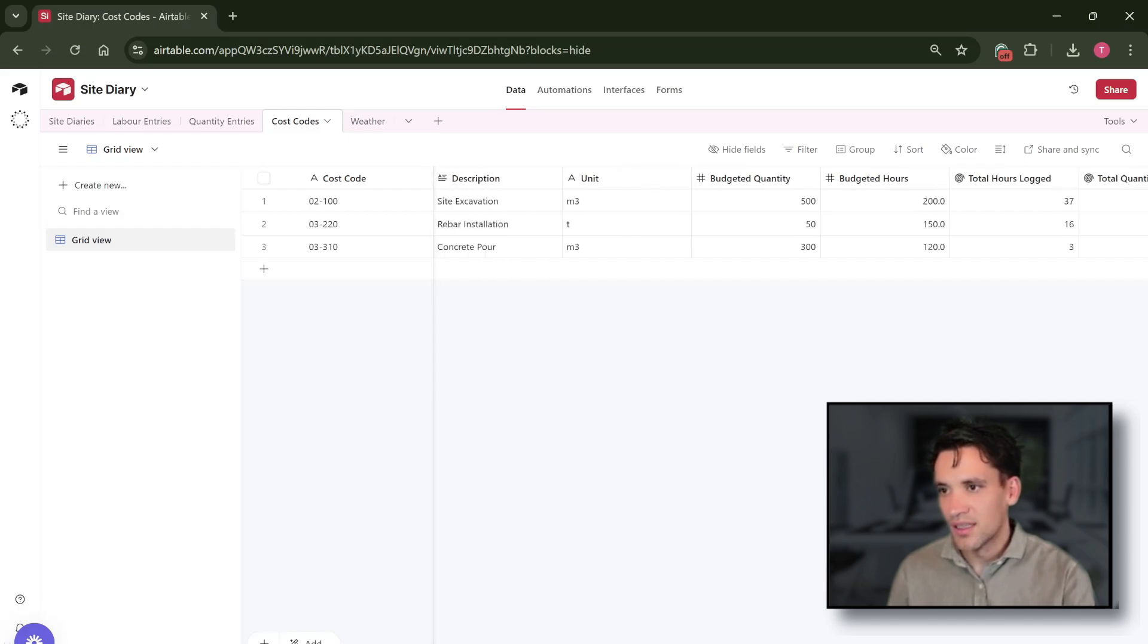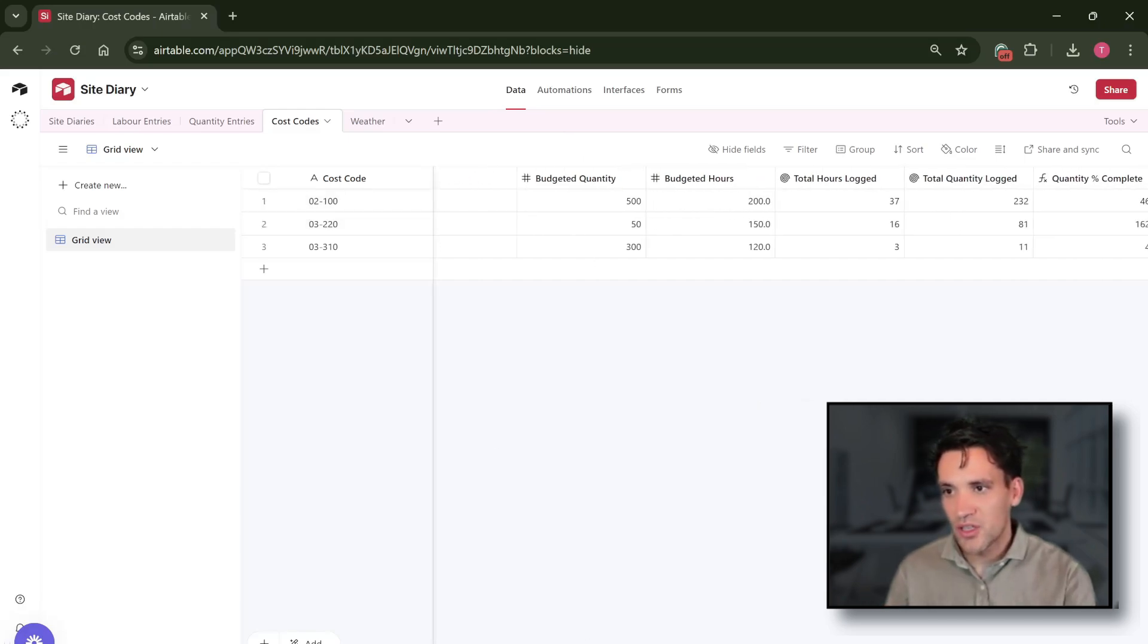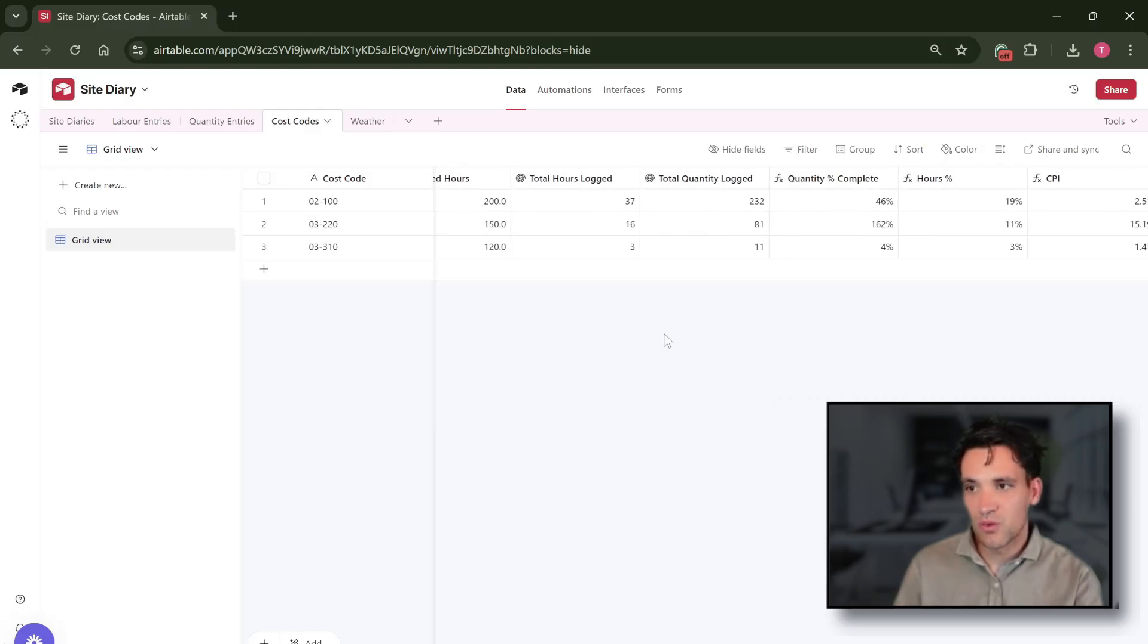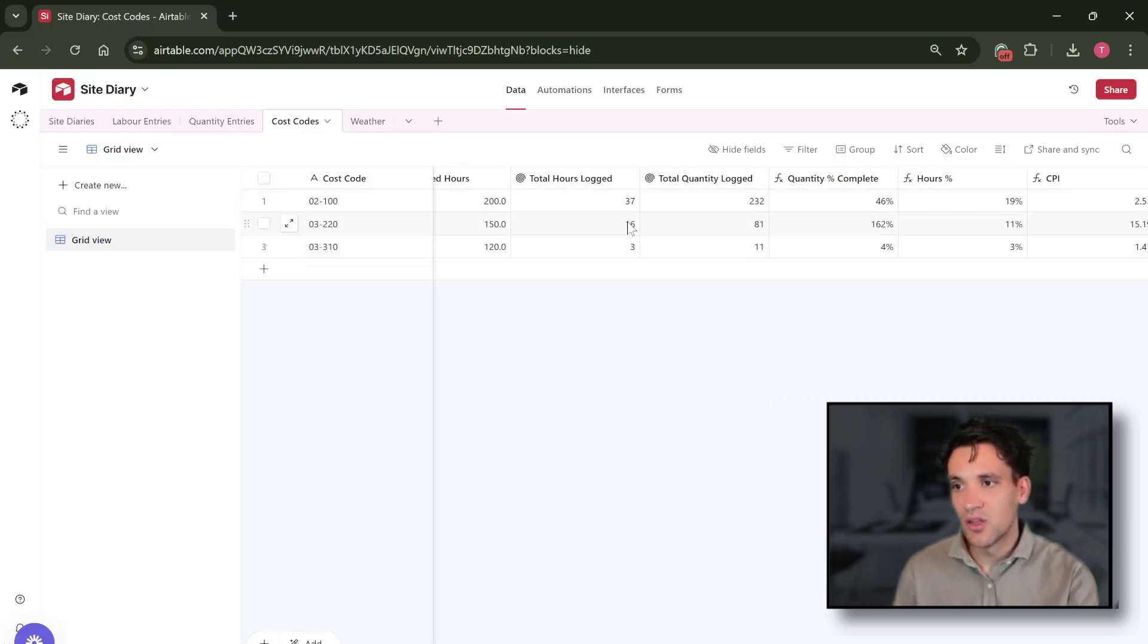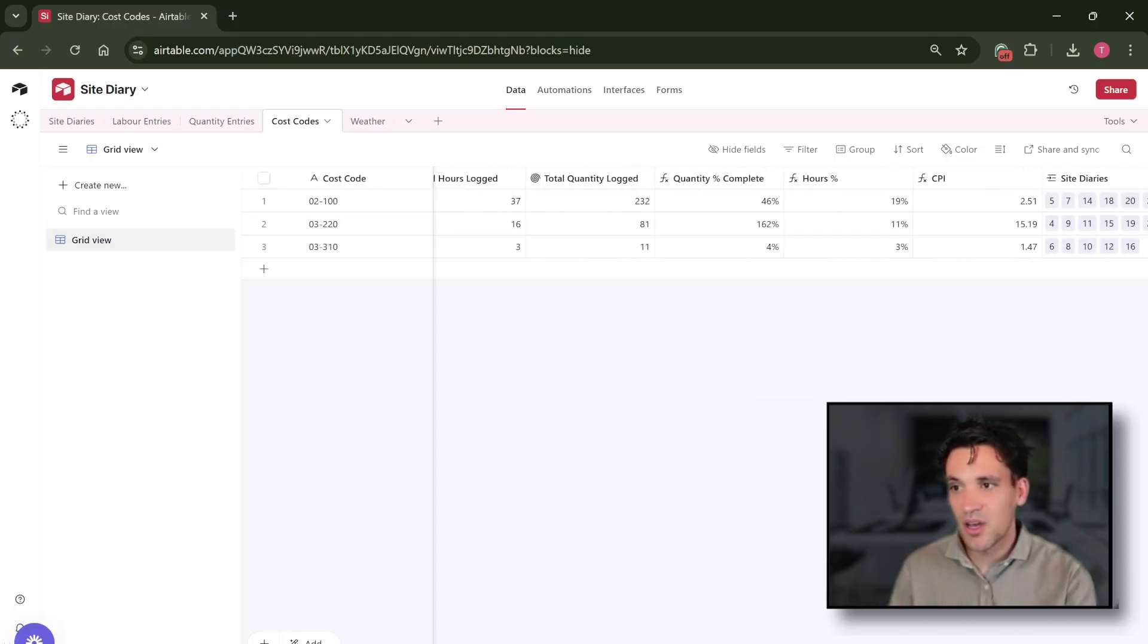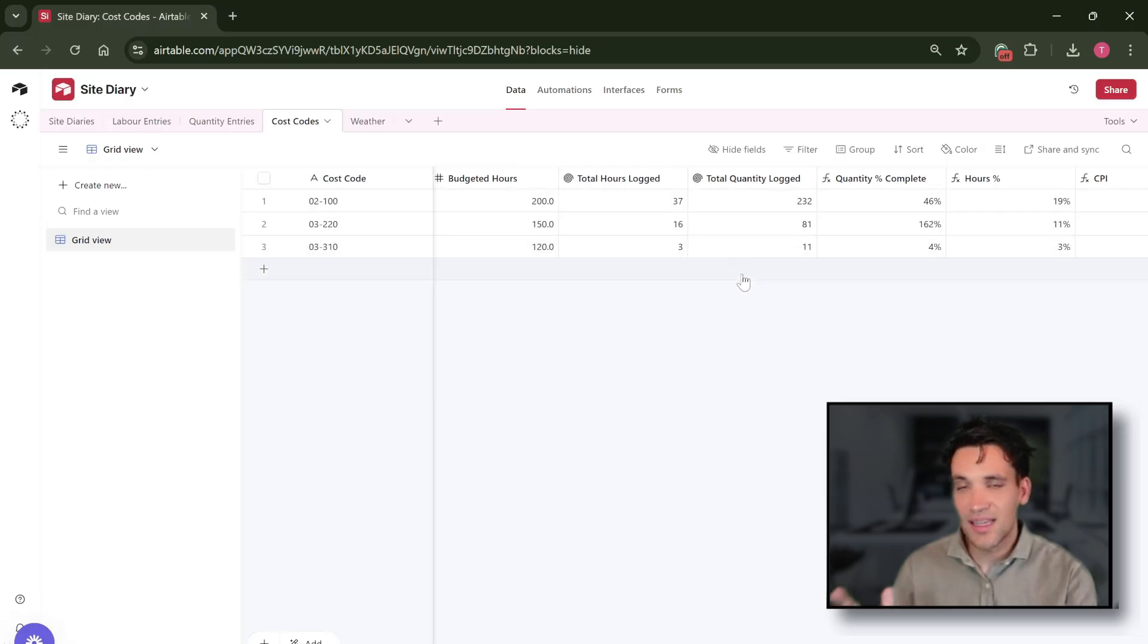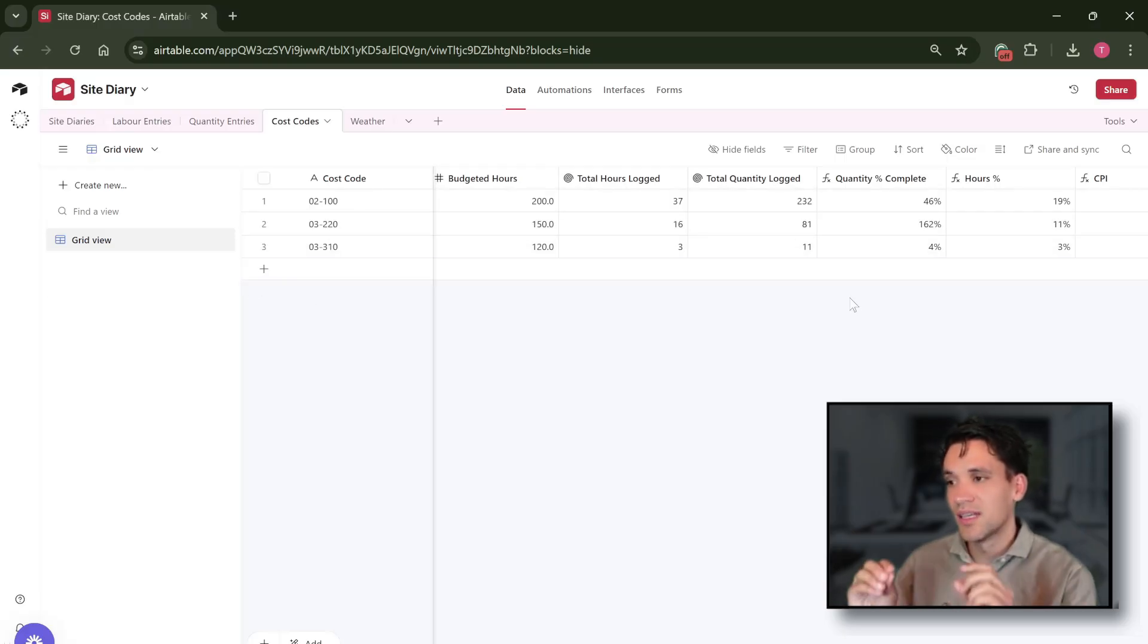We've got the description of the cost code, the unit of measure, the budget hours, the budget quantity of work, and then all the timesheets we fill out and all the site diary entries we fill out automatically track the hours against it. Then we can calculate some metrics like CPI or percentage quantity complete against each task. Again we can adjust this to suit whatever project we want to work on.